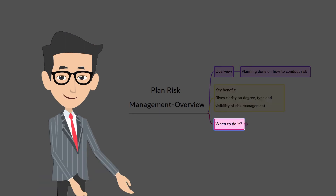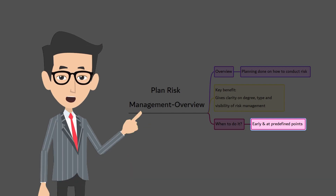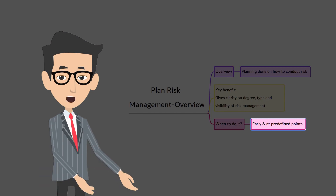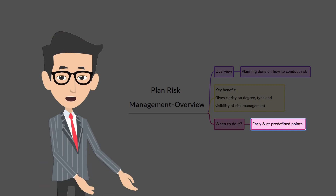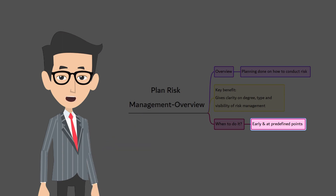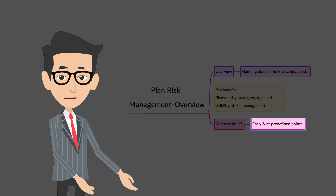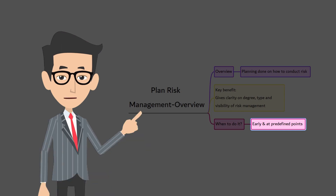The Plan Risk Management process should begin when the project is conceived and should be completed as early as possible in the project. It's an iterative process and should be performed once or at predefined points in the project. It may be necessary to revisit this process later in the project life cycle, for example, at a major phase change, if the project scope changes significantly, or if a subsequent review determines that risk management effectiveness requires modification.